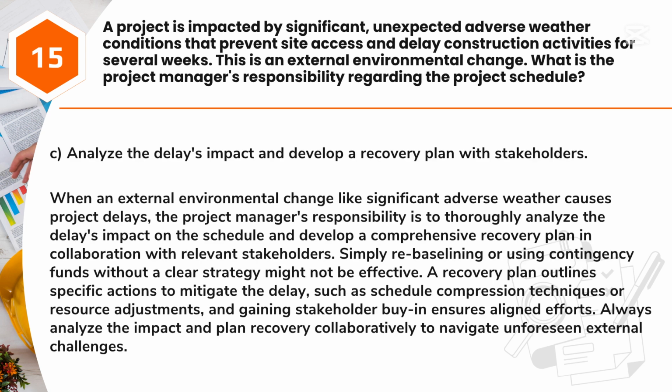Answer: C. Analyze the delay's impact and develop a recovery plan with stakeholders. When an external environmental change like significant adverse weather causes project delays, the project manager's responsibility is to thoroughly analyze the delay's impact on the schedule and develop a comprehensive recovery plan in collaboration with relevant stakeholders.